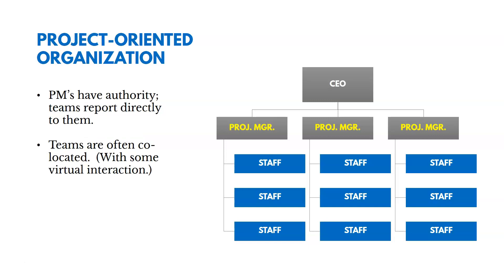In a project-oriented organization, project staff report directly to a project manager. Those project managers do their performance reviews and have control of the resources underneath them. The teams are often co-located — they'll sit in the same room or the same office building, and in some cases have virtual interaction. You can see how those two types of organizations are structured differently and how their hierarchies look.